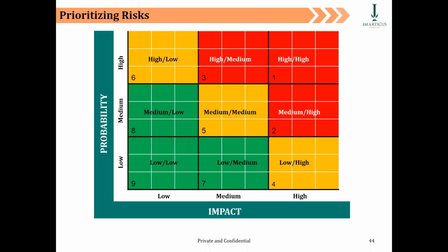So many times in projects, you are clear that the probability of occurrence for the change management process to kick in is very high, because I know these users are famous for bringing add-on requirements in every project. If that is the probability which you already know because you have certain information about it, you will categorize that as a high probability. And obviously if they are adding requirements, if they are small-time requirements, the impact is medium. If it is a large requirement, the impact is high.